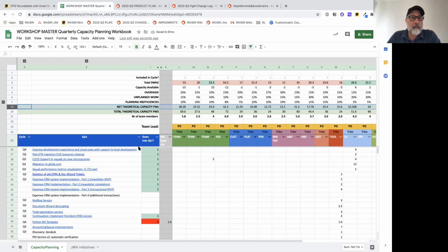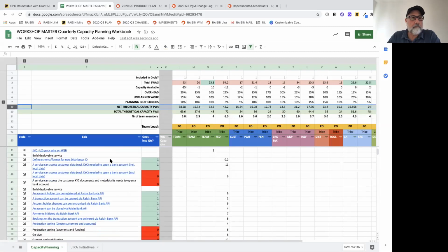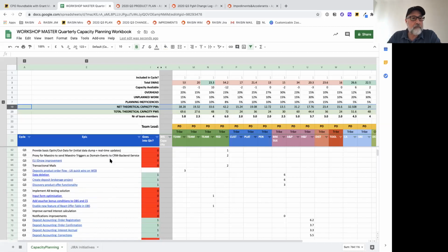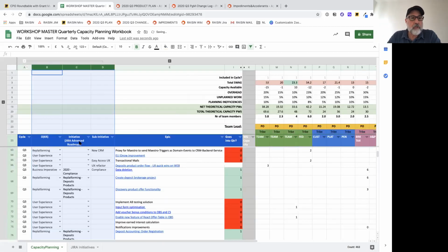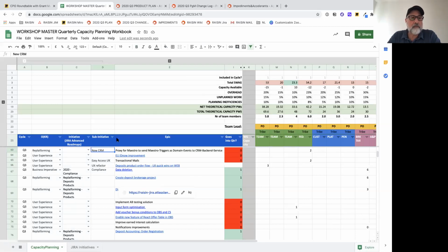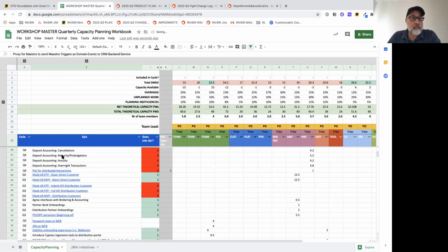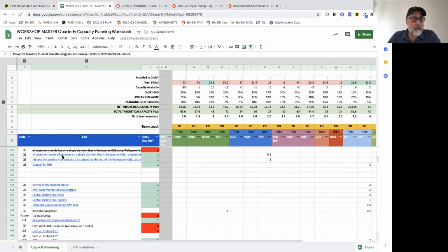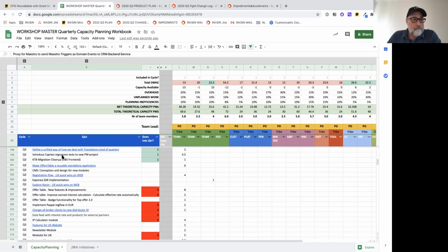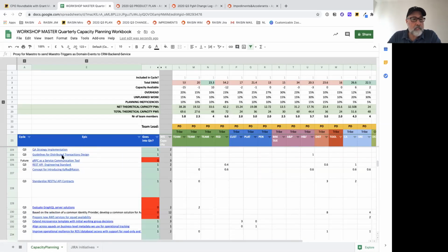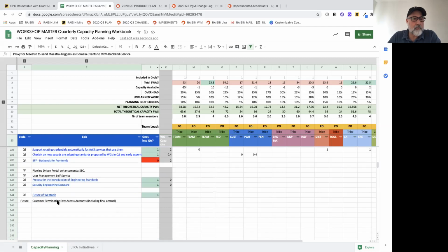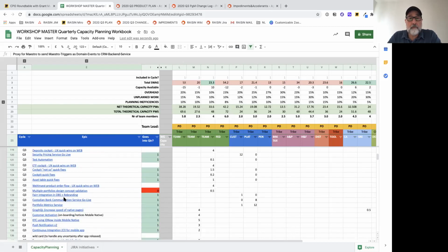And then on the left side, you see all the initiatives. Well, those are hidden here. We use Jira Advanced Roadmaps now, and so the initiatives are here. We may have sub-initiatives because there may be multiple ones within an initiative, and then the epics that actually comprise those initiatives. They all map to OKRs, et cetera. And this was last quarter. So this is everything across the business, across engineering, that people had the ambition to do: 245. And we go through every single one of those.